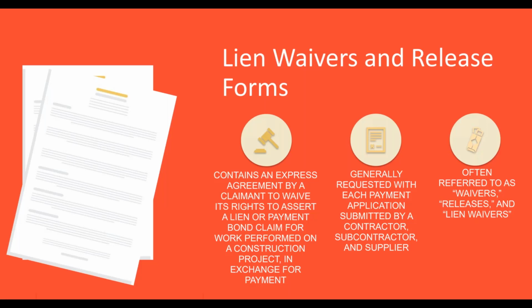So as we briefly touched on earlier, AIA Contract Documents has developed various lien waiver forms. And lien waivers are really a great way to avoid lien disputes on your project. Generally speaking, they memorialize that the contractor has waived its right to enforce a lien claim. So the contractor, after it's been paid, cannot later come back and place a lien on the project. No surprise lien claims on the project.